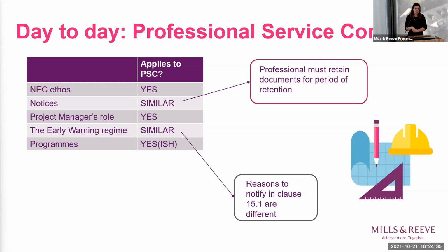So having looked at all of that, just see what's happened with regard to the other contracts. With a professional service contract, which is the contract you use when you want a professional as opposed to a contractor, so perhaps your project manager or your architect, the clauses that I've talked about are all very similar. So NEC ethos, exactly the same things that apply. On notices, exactly the same clauses apply, and then they've also added an obligation for professionals to retain documents in relation to the project for a period of retention that you set out in the contract.